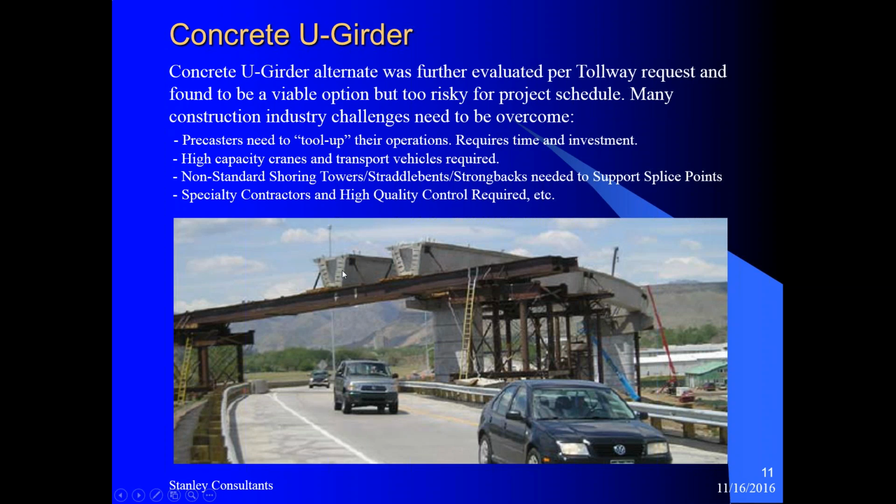It has been successfully used in Colorado, Florida, and a couple of others, Washington State and Texas, for this type of ramps. But in Illinois, it's not here yet. So the Illinois precasters need to tool up their operations to fabricate this type of girders, and it requires time and investment.